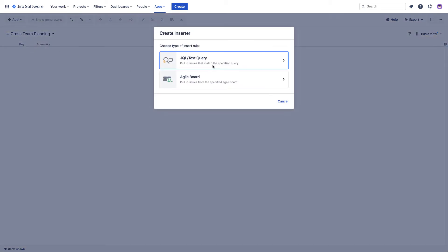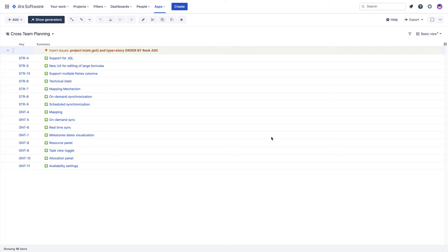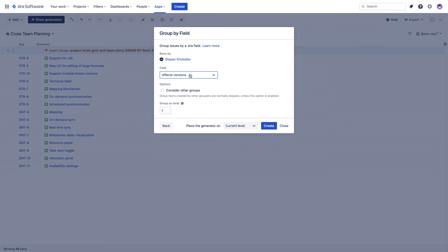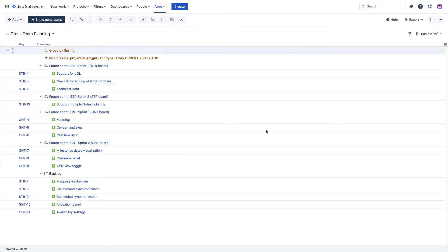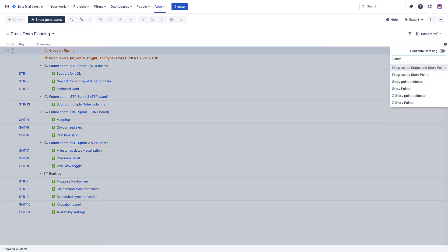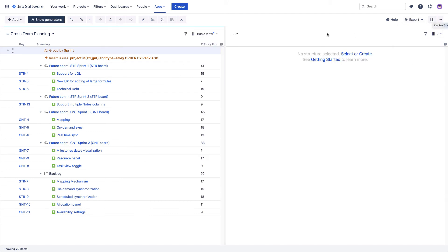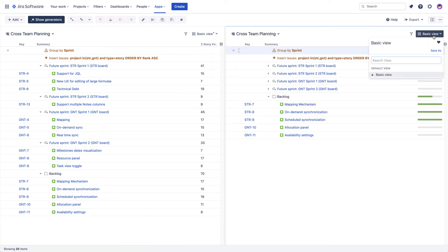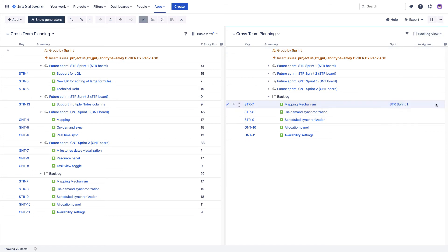Let's add them to our new structure first. To see how the stories are distributed between different sprints, we can use the group generator. In the story points totals column, we can see how many story points are already committed per sprint. For convenience, we can open the same structure in the second panel so we can focus on the backlog folder. If we know how many story points each team can handle per sprint, we can now assign the stories from the backlog to the appropriate sprints without overcommitting.